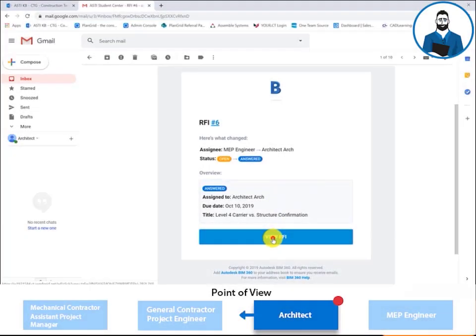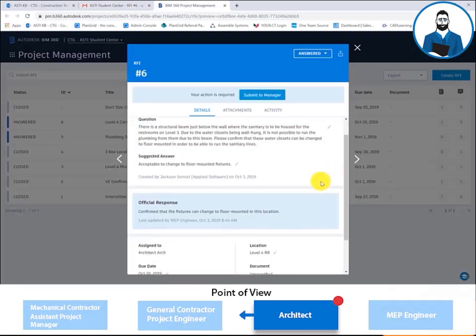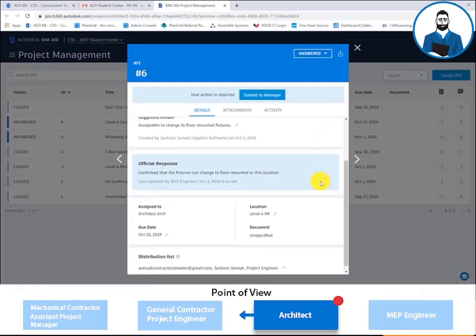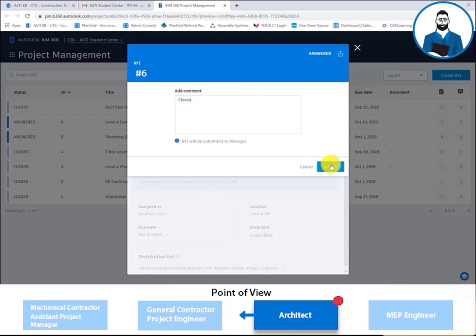Once the MEP engineer issues the official response, the architect is notified via email. From there, the architect reviews the official response and then submits to the RFI manager, the project engineer.